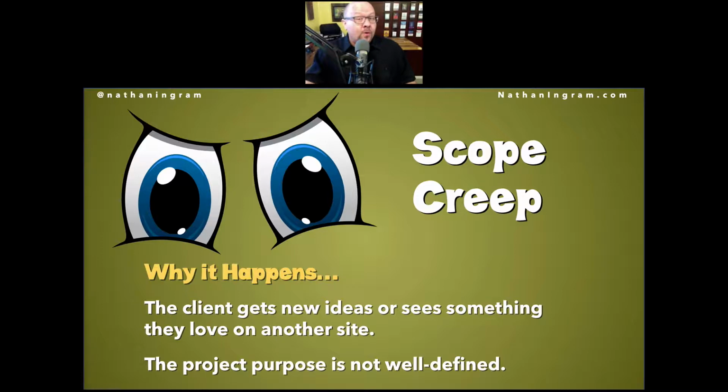So these are part of the questions that I ask at the beginning of every project. What are we actually trying to accomplish here? What is going to make this project a success? How do we know this project was successful? What is it that you want your audience to do when they come to your website? How do we manage this project and know that we're successful? How is it measured? So when scope creep happens, it's usually because there's all these new ideas out there and we haven't really decided what the project is supposed to be. And so it starts to creep.